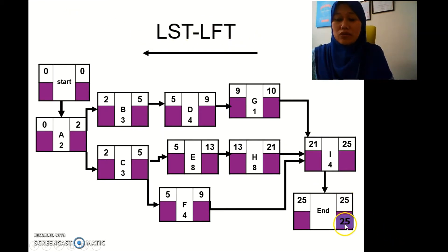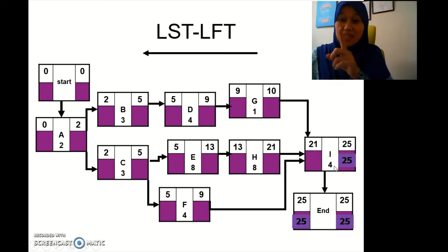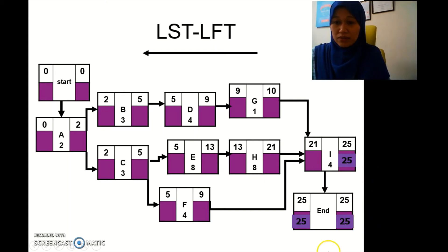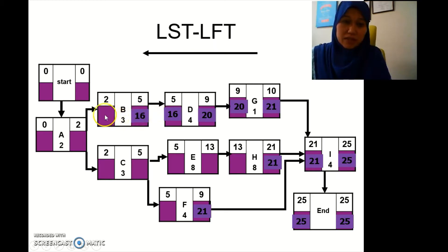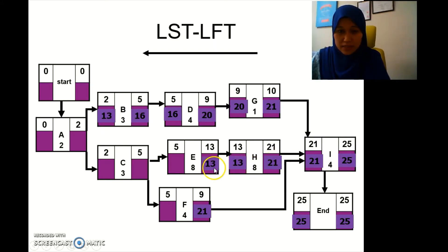We start from the end going backward. At the end box: 25. We bring 25 here — when going backward we subtract the duration — so 25 minus 4 gives 21. We bring 21 here, here, and here. Starting with the top row: 21 minus 1 is 20, bring 20 here. 20 minus 4 is 16, bring 16 here. 16 minus 3 is 13.